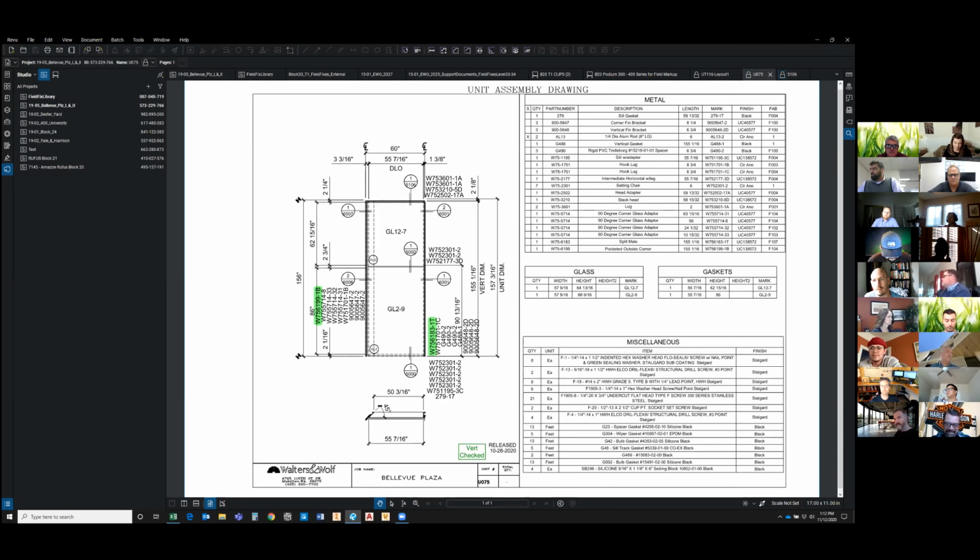From the unit drawing, I was able to get to a detail. Originally we played around with putting a binder of drawings on the server, but what we found is it's a lot easier to have the drawings all separate, because then you can replace a drawing quite easily if there's an update.